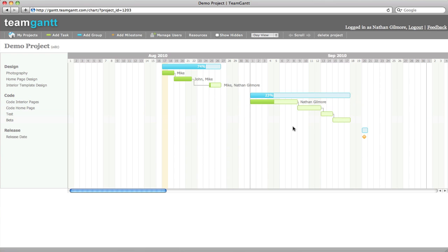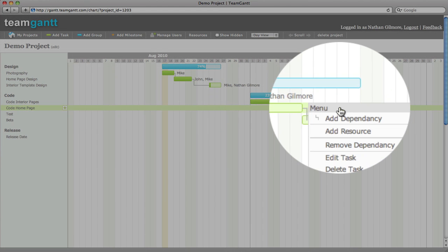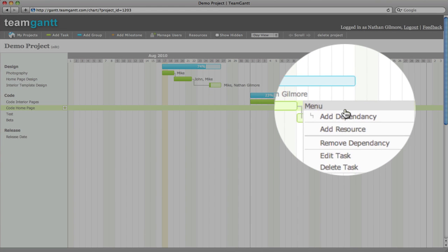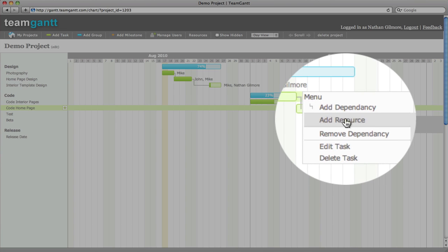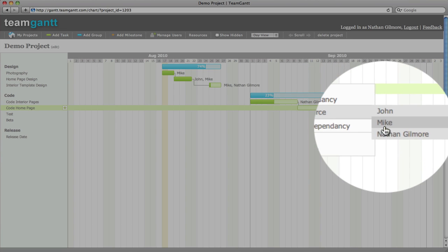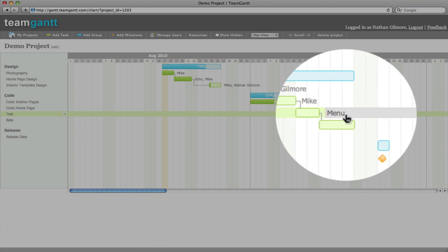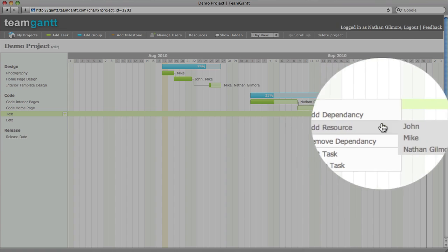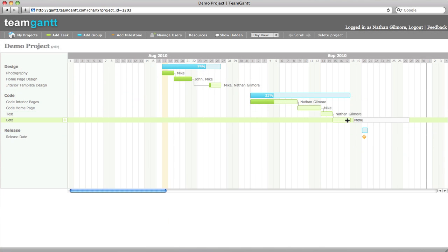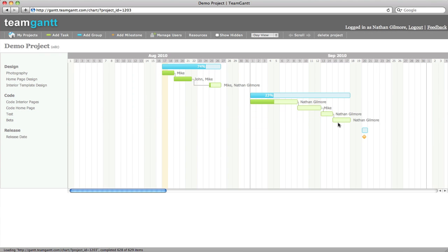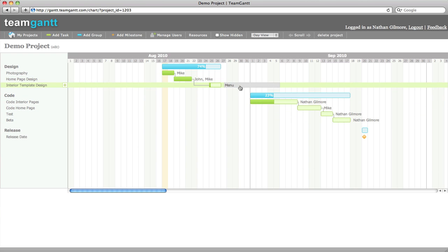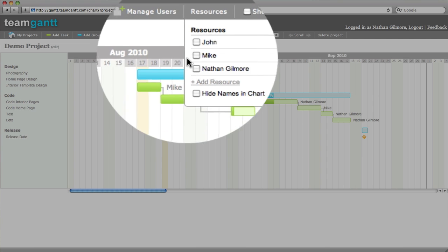Another great feature of Team Gantt is resources. You can use resources to assign people or teams to tasks. To do this, simply click add resource and select the resource. Anybody that you've invited to your project is automatically added to a resource. You can also add more resources.